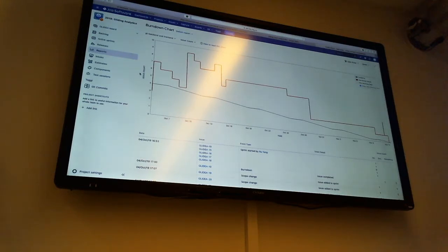And the other question is, do you have this very long from October 16th to almost 28th? Is it because tests are large or is it also here the case that you were done with the test but no one reviewed the code so they weren't marked as done? Yeah, I think so. Maybe a little bit of slack on marking as done. Because we felt we had to meet up and everything, everyone had to go through it. So you can see when we mark things is usually when we've been working together. So then we just mark things done and we're finished with the day. And also added points when we have a meeting as well.